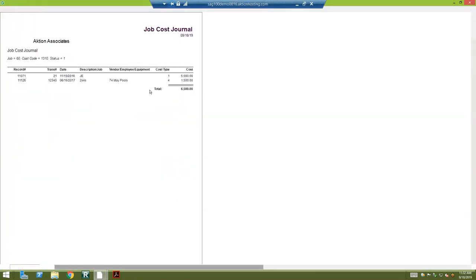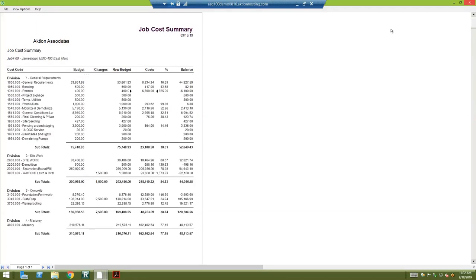If I double click on it, I actually have a journal entry in here and I have a vendor invoice. That's how you're marrying the cost code to the actual AP invoice and labor.